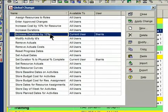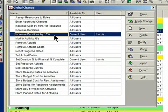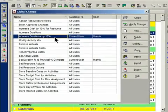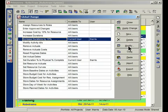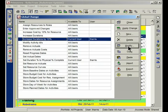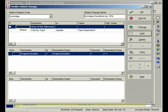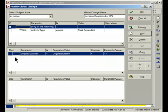Notice here I have a Global Change already created, the one that's highlighted called Increase Durations by 10%. This Global Change actually goes through all of the activities in the project that are a certain type and increases the durations by 10%. If I were to click the Modify button here, and we'll just scale this in a wee bit, you're going to see what happens here. You'll see how my screen is divided into three sections.